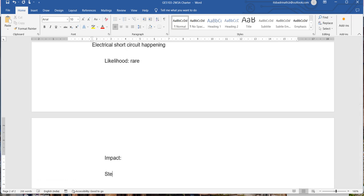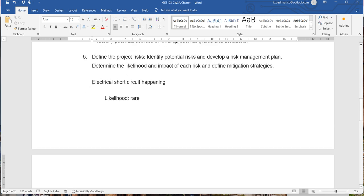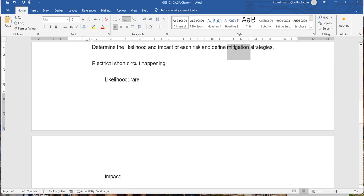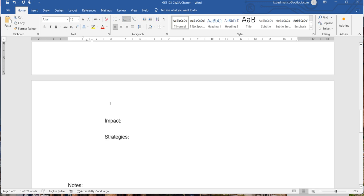Then write strategies to overcome each risk. Take at least four or five risks. For each risk, you are supposed to write the likelihood, impact, and what kind of strategies you can apply to overcome it. For example, floods might happen, unexpected rains might come, power cuts might occur, or participants might be absent — if performers don't show up, attendees may agitate because part of the event is not conducted. Take very general real-life risks and for each mention likelihood, impact, and strategy.